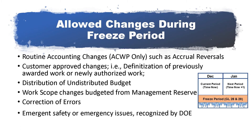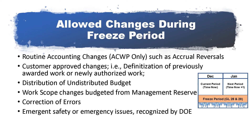During the execution of work scope, there may be safety or emergency situations which require immediate action, regardless of documented authorization or eventual source of budget. These emergent issues may begin immediately with coordination of the DOE. Associated change documentation should be initiated and implemented on an as-soon-as-possible basis.